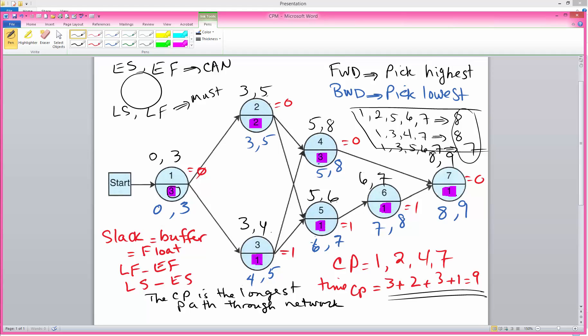The critical path tells us the earliest time that we can finish this project. Essentially, we cannot finish this project any earlier than nine weeks given the amount of resources that we have planned to allocate to the project.